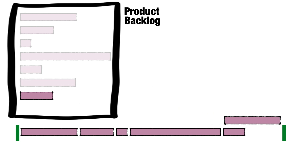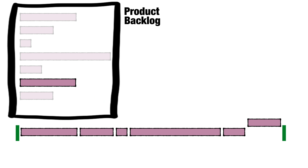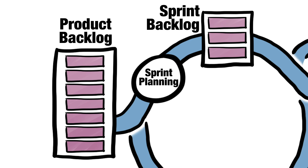Could it be that creating a Sprint Backlog is as simple as taking items from the top of the Product Backlog until the story points equal the capacity — perhaps with a bit of jiggling around at the end to fill the space? If it was as simple as that, there'd be a button to do it in Jira. There's not a button for that — or is there? Not a clue.